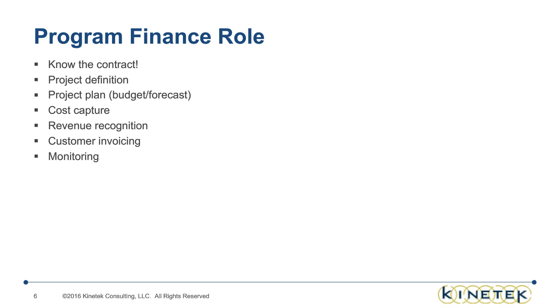And their contracts are coming with more and more complexity and more scrutiny. So we're seeing contracts now that take on new and interesting mechanisms to earn a dollar. I mean, cost plus, T&M, and firm fixed price were all we knew in the past. Now we have interesting new contract vehicles. We've got T&Ms that have indirect rate caps, so you get the best of both worlds of T&M and cost plus. We've got cost plus with no plus sometimes, which I kind of chuckle about. And then we've got the ever popular hybrid, in air quotes, this combination of everything we used to do, plus some new and painful scenarios added on top just to spice things up.